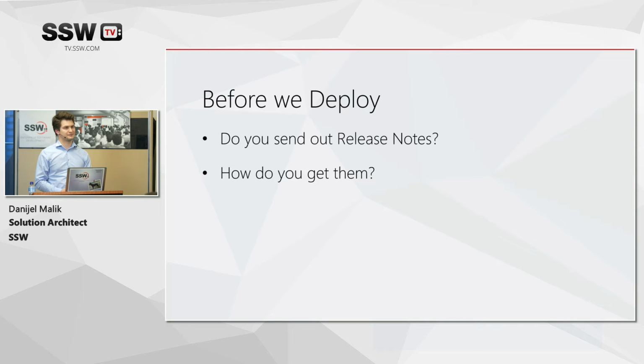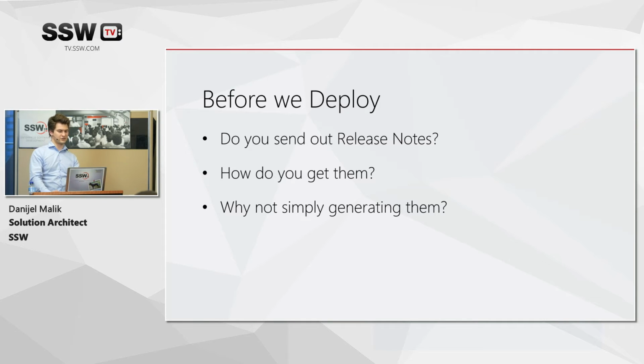For example, in our case, we're using the Jira portfolio. Okay. We have initiatives, and initiatives are release-based. So you can tell from your initiative when it was released and the date and the epics or stories in an epic. So you have them in a monthly dashboard. So you can get out the notes for the past 14 days. Okay. Which release you want, that gives you everything. That's good, and you can generate that. Yep, that's really nice. For those of you who are using Team Foundation Server, you don't get anything like this out of the box.